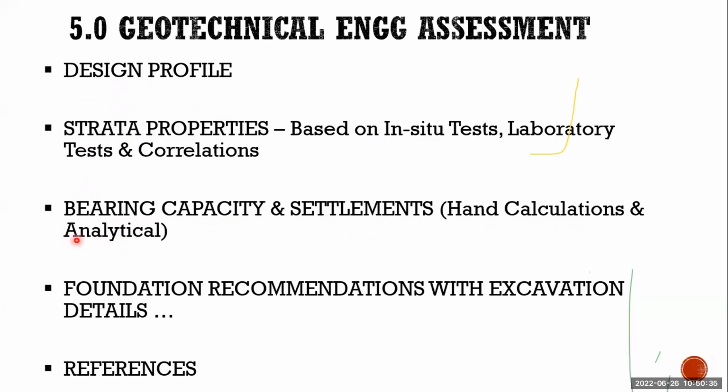If you have any software, you can use it, and we include the foundation recommendations with the excavation details. What is the depth of foundation, either shallow or deep? If you require shoring or any dewatering, we have to mention it, and we need to include the references. Next slide.